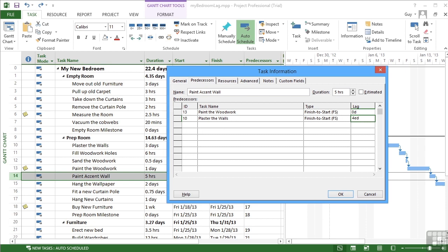That's four lots of 24 hours consecutively for the plaster to dry. And that will be added on to whatever other gap already exists between plaster the walls and paint the accent wall. That's okay.